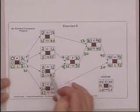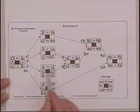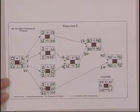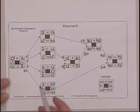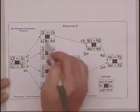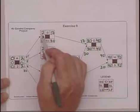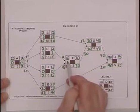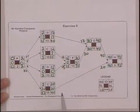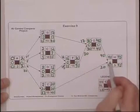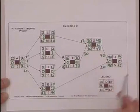Here we have zeros, which means delay in activity D will delay the project. This is an indication that activity D is on the critical path. Then we have 3, and 2 from 15 is 13. And then we go here, subtract those two, and we got zeros, zeros up here, and then the last activity naturally has zeros.